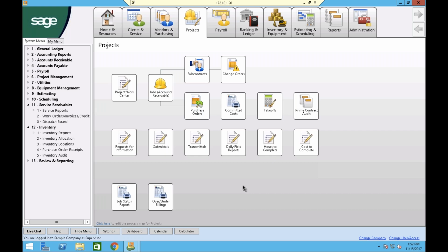Honestly, what most people tell us is they want more information, accurate information, and quicker. I've got a 4-month job. I don't want to find out in the 3rd month that I'm going over budget. So this gives you daily updates, weekly in the case of payroll, and it gives the project manager a chance to bring the job back online if it's going off the tracks.